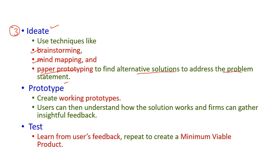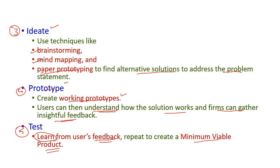The fourth stage is prototype: create working prototypes so users can understand how the solution works and firms can gather insightful feedback. The fifth stage is test: from user feedback, we test the project to determine whether the minimum viable product is obtained. If not, we repeat the process until we achieve the minimum viable product.